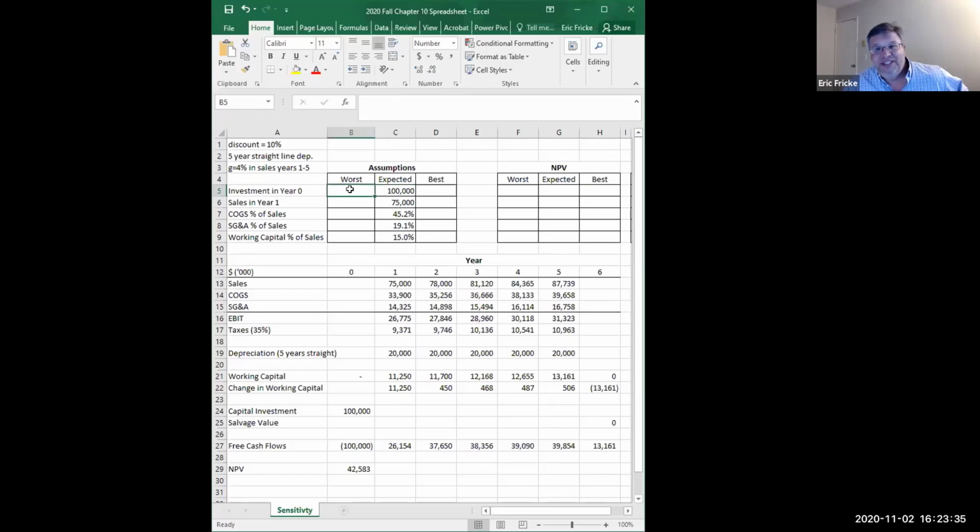But then you do some research and you ask around. Let's say they're building some house and they find there's not solid ground underneath, and you weren't expecting that at all. So let's forecast that we could be 20 or 30% over budget if something goes wrong.